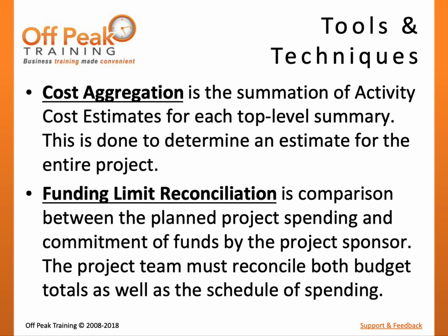Funding limit reconciliation is a technique involving negotiation between the project management team and other project stakeholders. The goal is to reach a project budget that all parties can agree to as being achievable and acceptable by funders such as the sponsor. This may require some back and forth and compromise between the various parties.